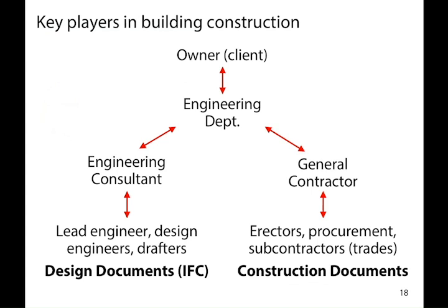When it comes to building stuff, generally there's someone who wants to build something, and they're usually the owner, or in engineering terms, the client. Usually the owner, like at MBDTI, for example, they've got an engineering department that looks after engaging different design firms to do the design. They're responsible for engaging the contractors to do the construction. And so oftentimes what happens is the engineering department for the owner is going to say, okay, we need an engineering team, and we need someone to build this. They ask for proposals from different engineering consultants, hoping to get the lowest price on design.